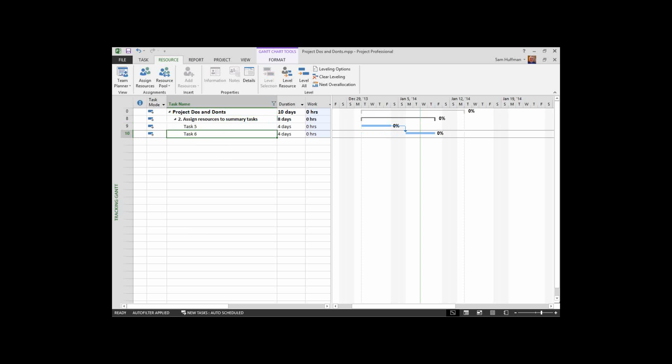Let's see here. Bert said, Sam has to do all the tasks, so there's no slack. Would there be slack if different people? Yes, that's absolutely true. Why is the leveling delay in elapsed time, not working days? Bert, that is the design of the tool, that it is in the elapsed duration units rather than in whole days or whole working days. So just the design of the tool is to impose leveling delay.